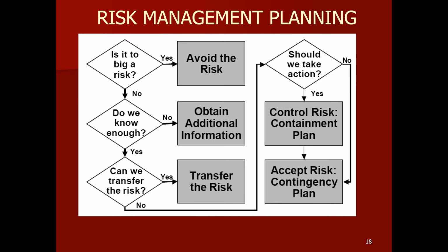And basically, you can think of this as risk planning, management planning. The idea is, of course, if it's too big of a risk, we don't want to tackle it. If we don't know a lot about it, we better get more information. Can we transfer the risk? Can that risk be put on somebody else, or can we outsource this part or this piece and say, well, they're going to be doing this and make sure they're holding the risk? Sometimes that can happen. Sometimes it can't. Maybe there's other ways in which we can take action.